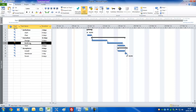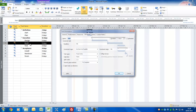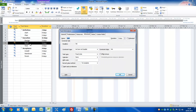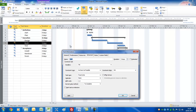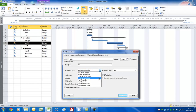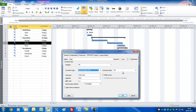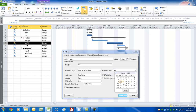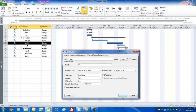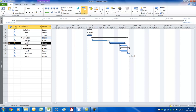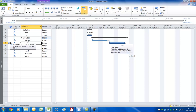Let's say for the Build task that you need to wait until some materials are delivered — it's an external dependency, and it's the 26th of January. So let's put a 'Start No Earlier Than' constraint, just to show that you won't have the materials to start building until the 26th. Press OK. You can now see a one day delay here, and there's a little symbol indicating this task has a 'Start No Earlier Than' constraint.